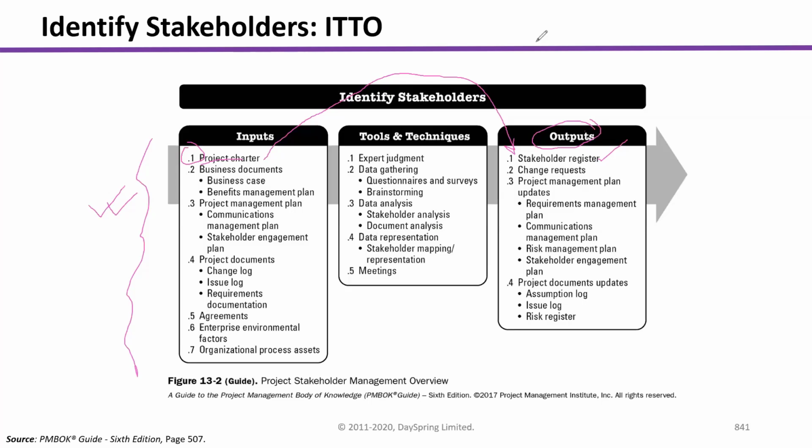Yes, stakeholder. So the sponsor's name is in the project charter, so their name I will bring into the stakeholder register. Then there is another section, pre-assigned resource. Can you remember pre-assigned resource? That means if there is some resource, a person or a team, their name also will be included in the stakeholder register. So that's why we are taking the project charter.